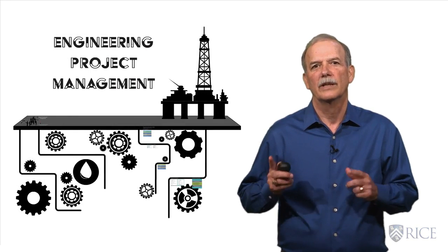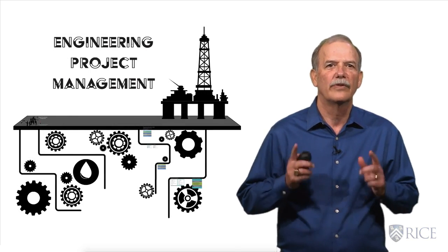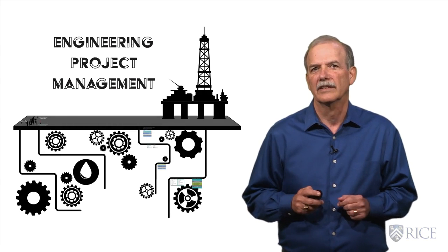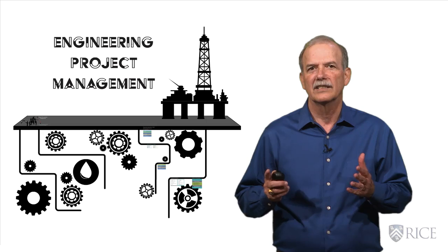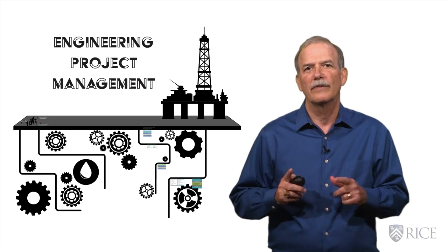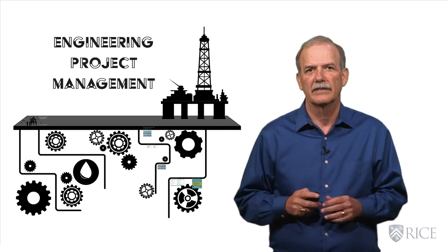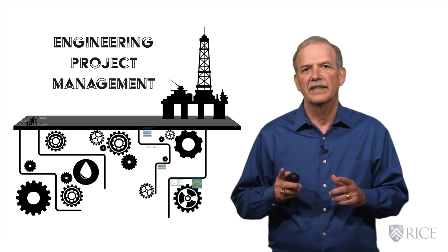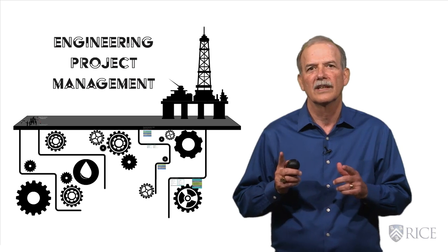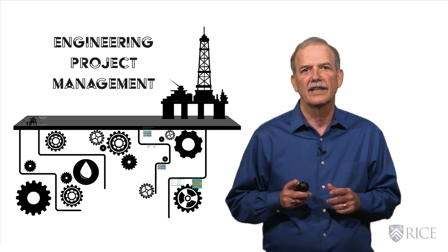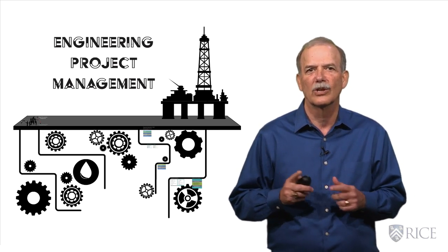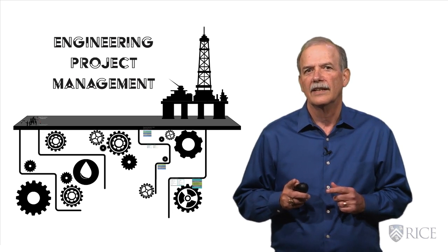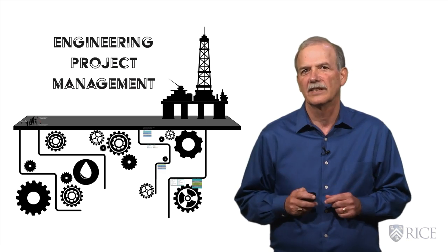The first step in the procurement management process is to develop the procurement management plan. As with all other plans, the procurement management plan is part of the overall project management plan. The procurement management plan documents our approach to procurement, documents any decisions we made, such as what goods, services, and results will be outsourced, and it identifies potential suppliers for these items.